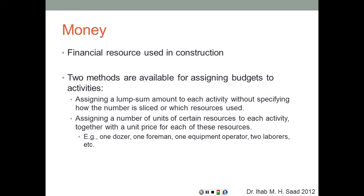Money is the financial resource in construction. Two methods exist for assigning budgets to activities: assigning a lump sum per activity without specifying which resources are used, or assigning specific quantities of resources with unit prices. For example, an activity costing five thousand dollars could itemize one bulldozer, one foreman, one equipment operator, two laborers, etc., and knowing their hourly rates and durations, the total can be translated into money.